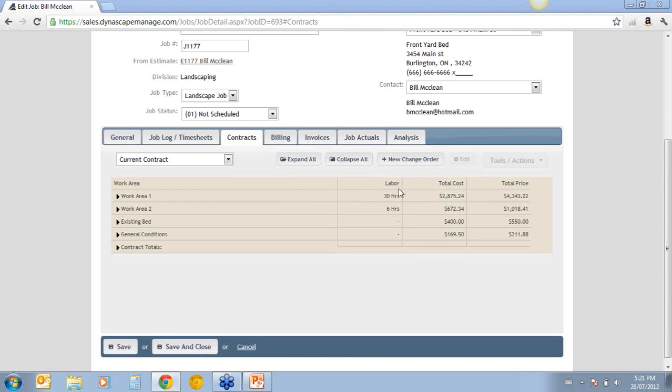And yes, the change order will be estimated at the same rate as the original margin. The original margin that the job was sold at is the margin that you'll use for the change order. So everything will be the same, and you can actually step into any of those items just like you could on the estimate screen and change the pricing if you would like.